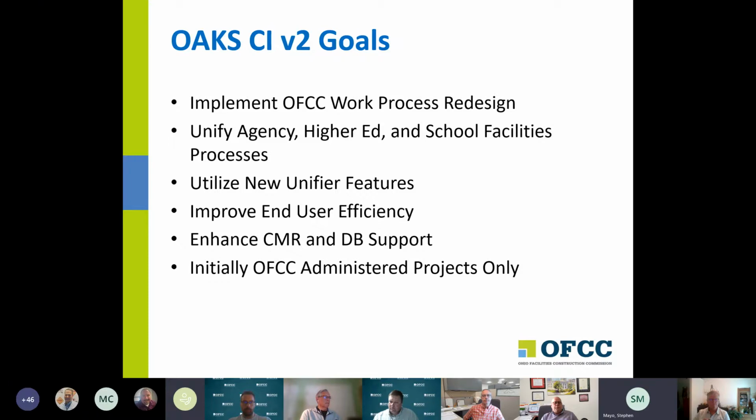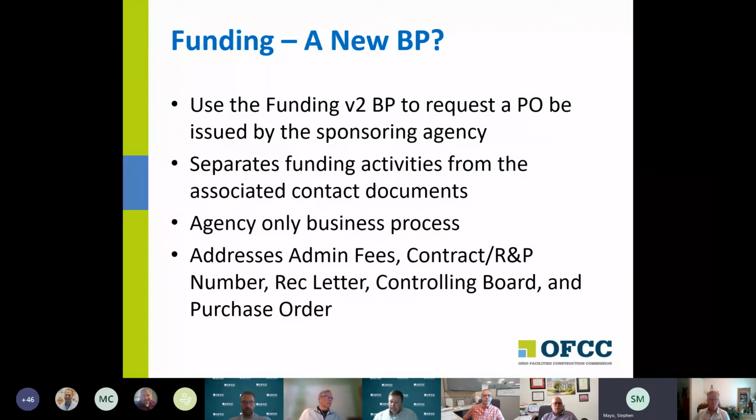Right now, these kinds of activities are being done by K-12 outside of the process. So this is a brand new BP. There is no original version equivalent in OAKS. We use the funding BP to request a purchase order be issued by the sponsoring agency. And that's really what it is. It's to request a purchase order.